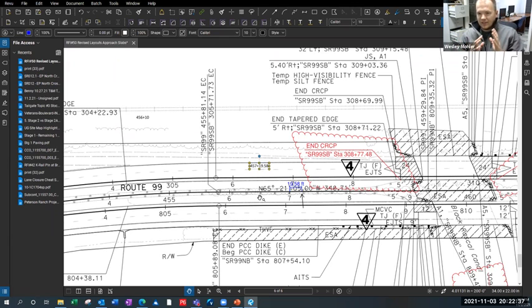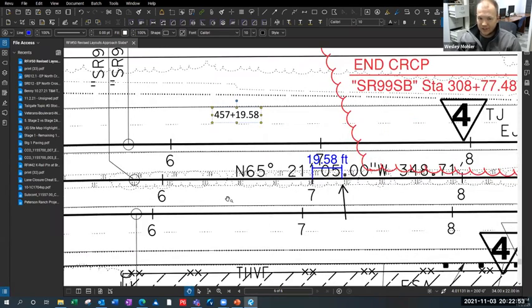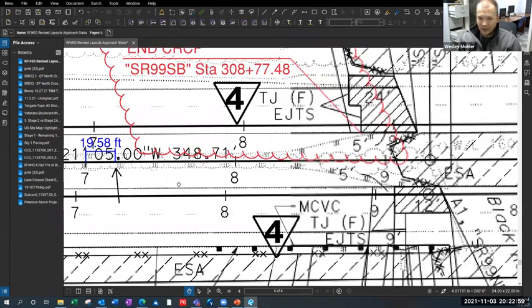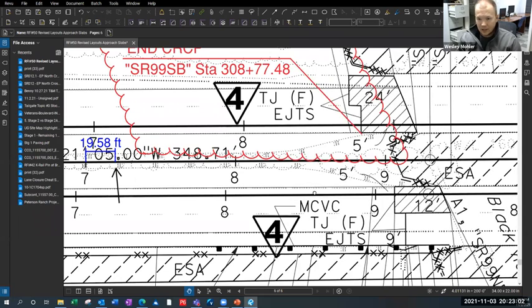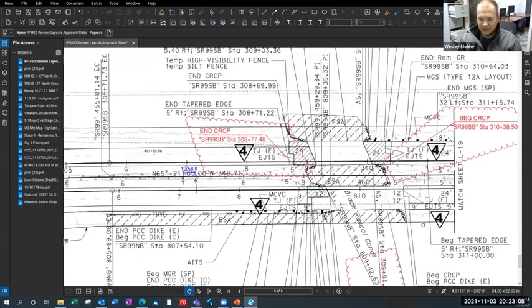It doesn't usually span over, you know, 5 miles at 200 foot wide. So the reason we have stationing for civil is because they're really, really long projects and you need to reference a specific point. When you get your pavement survey stakes, they'll come with the stations on there so you know where you're at and you can do layout based off the station and know exactly where that bush is that you have to take out or where this bridge is supposed to start, this approach side. So all it is, it's a reference.